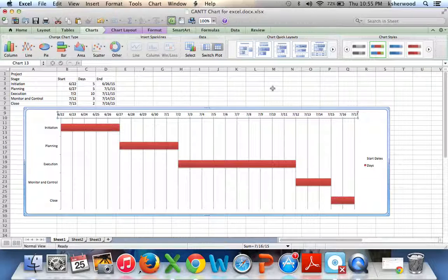It takes out the steps for the normal project steps. Most Gantt charts are going to be a lot more specific. Your initiation phase is going to have sublines like project charter sign off, your team selection, and then your planning is going to have kind of a rolling wave sort of functionality, so there may be some overlap into execution. Your execution is of course going to have some key milestones of what deliverables are due when, and monitoring and controlling the same sort of thing with sign off and implementation. And then of course close is going to have the final delivery.